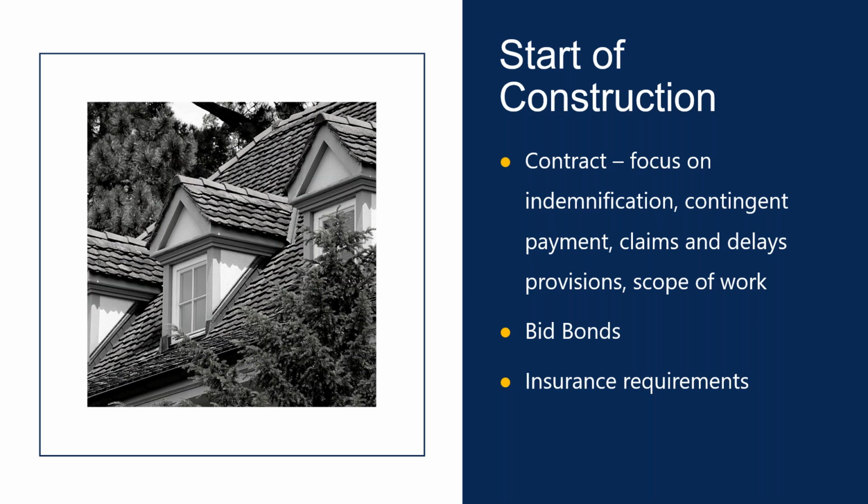So for those of you that do residential, I see a handful of you on the line that I know pretty well. I had a guy come into me 2 months ago with a dispute. His contract said re-roof. Okay, I know what a re-roof is. John Kenny knows what a re-roof is. You guys know what a re-roof is. But from an owner's standpoint, re-roof includes replacing bad decking. Okay, from our standpoint, it doesn't.